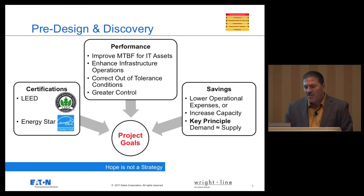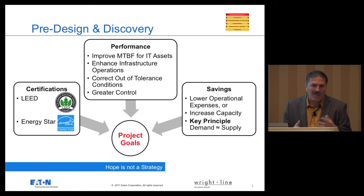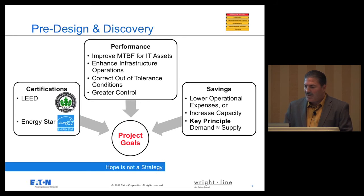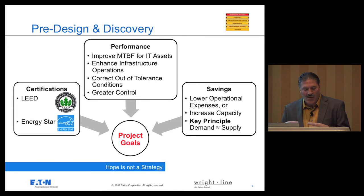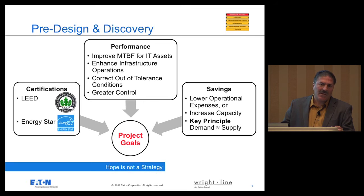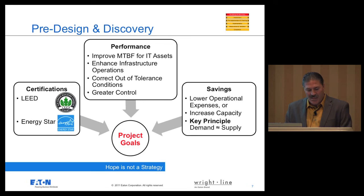Also as part of this phase, it's important to define utility rebates and look at certifications the team wants to comply with, such as LEED and ENERGY STAR for energy savings, high-efficiency UPSs, or ENERGY STAR-rated servers. They may set performance goals like correcting audit tolerance conditions within the data center. All of these things are important to building a project plan and setting goals. This helps stakeholders develop their CAPEX plan and proposal for upper management to gain approval. Hope is not a strategy — you've got to have a solid plan.